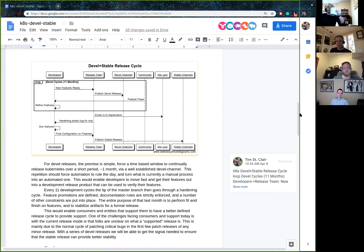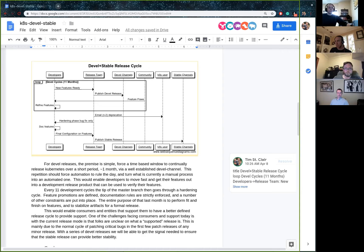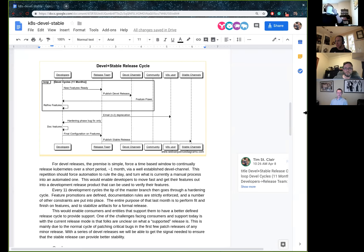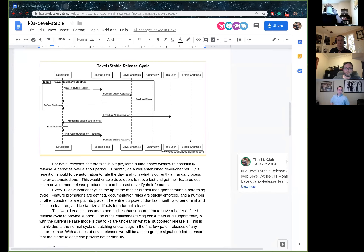The longer the time distance between stable series, the higher the incentive is to try to get stuff into a given stable series regardless of readiness. I appreciate the goal of this, but I anticipate a lot of trying to prove that things are meeting requirements even when they might not actually be meeting them fully, just so they could make the current release instead of waiting a year.